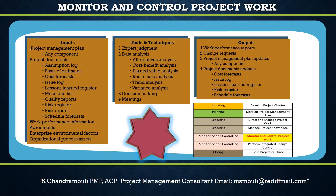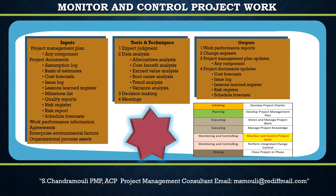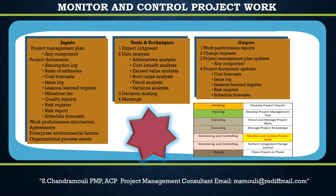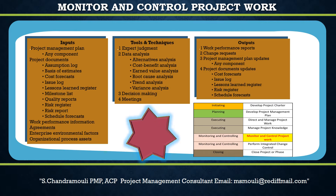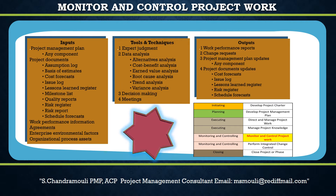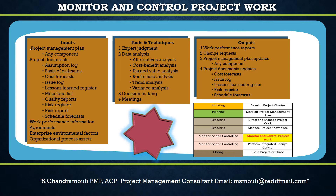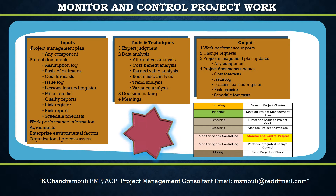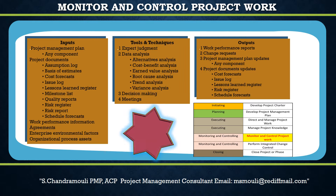Let us see the outputs of the Monitor and Control Project Work process. The first output is Change Requests. Change requests may be raised due to the following, but not limited to: one, corrective action; two, preventive action; three, defect repair.